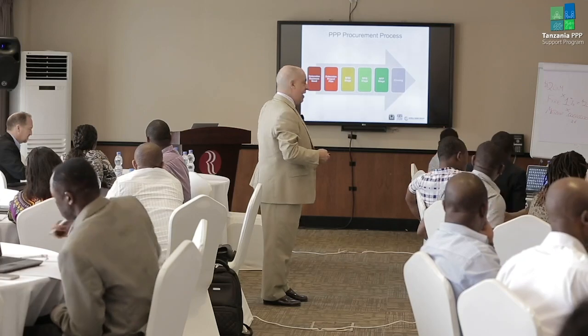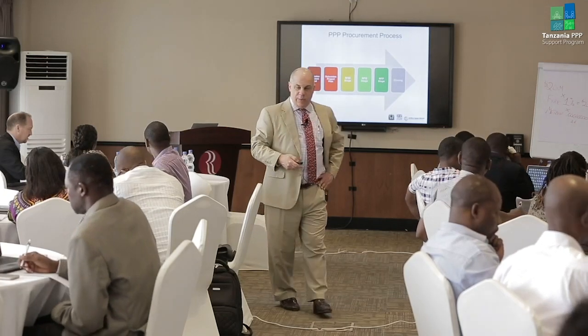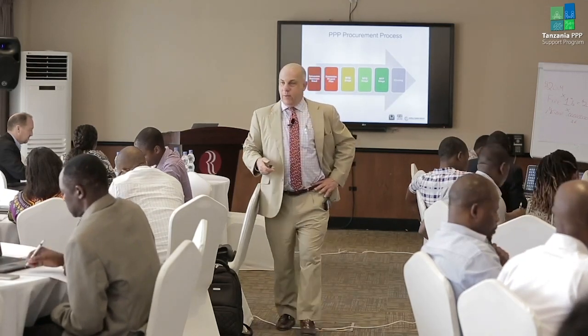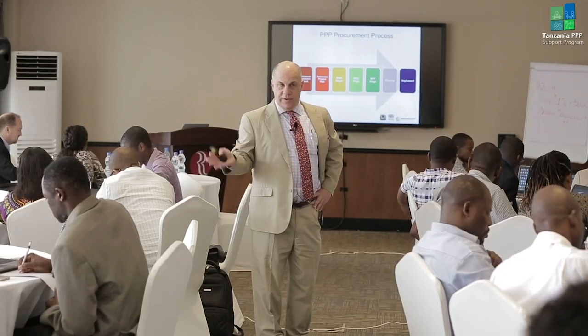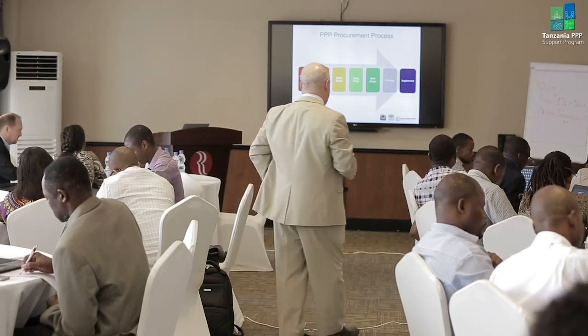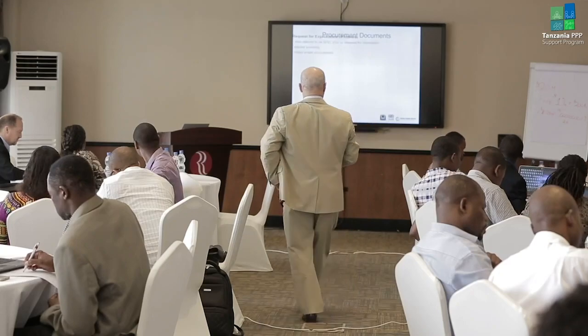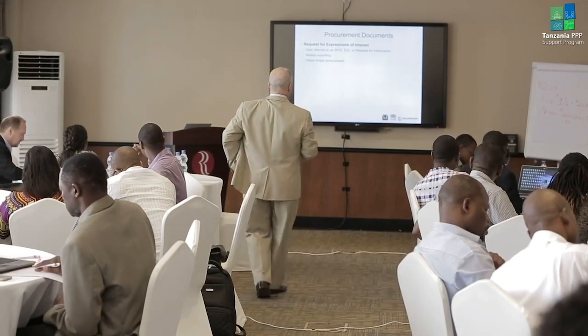okay. And if we get our RFP, we get our proposals in, then we have a closing. We could have, as I said, two closings, our commercial closing and a financial close. And then once we have our financial close, implement the project. It's fully funded. You could start building and operating.